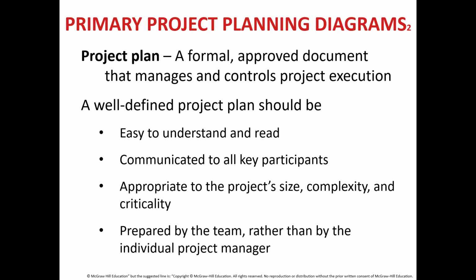How would they feel about a project plan that they created along with the project manager? Would they work hard to meet the deadline? Probably yes, because they define the timeframes they require to finish the tasks. A project plan is a formal approved document that manages and controls project execution. A well-defined project plan should be easy to understand and read, communicated to all key participants, appropriate to the project size, complexity, and criticality, and prepared by the team rather than the individual project manager.